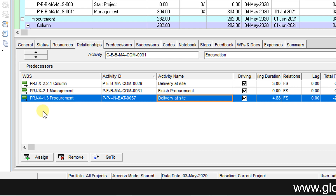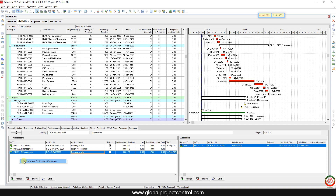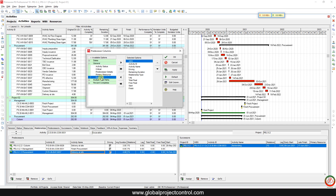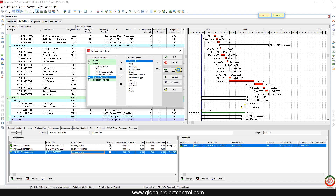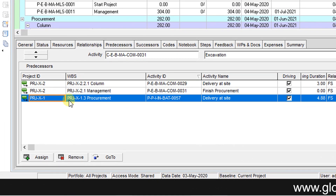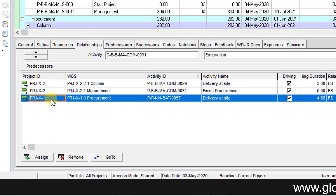If you know the parent ID for the WBS, then you can find the differences between WBS IDs for these two projects. But if you right-click and go to 'Customize Predecessor Columns', on the General section you can find 'Project ID'. If you add the Project ID column before WBS and apply it, you can then identify which project each relationship belongs to.